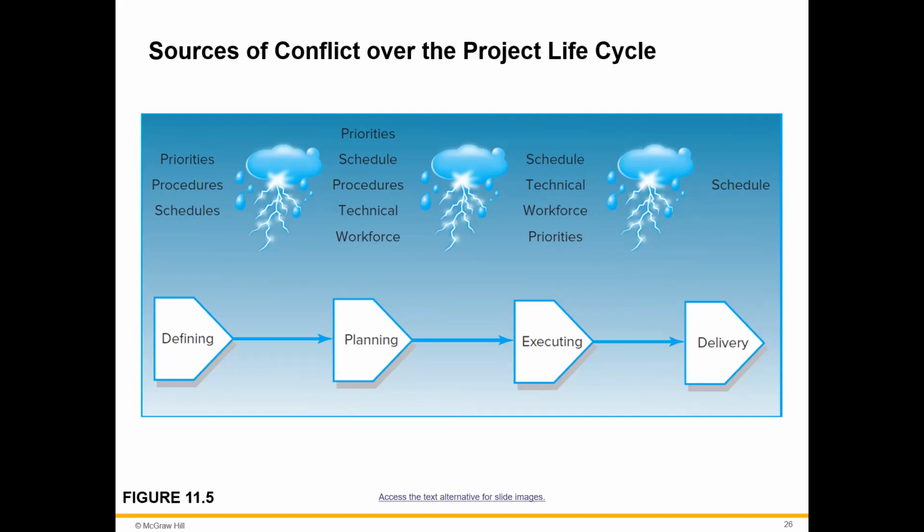Then afterwards, priorities are still important, okay, and all the necessary items like workforce and technical skills, but procedures are done. Your procedure is already there. It's there and set. You cannot move away. So I will give Trent hats off for still pursuing the alpha 1, 2, and 3 testing because that was the procedure, okay, and we agreed on it, and it was done in definition and planning, so we cannot walk away from it.